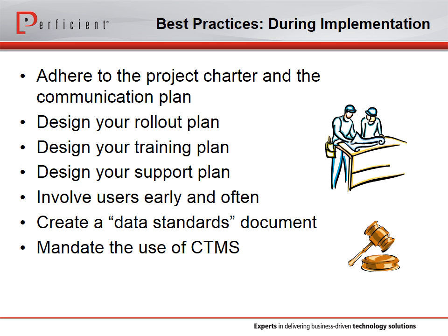The post-go-live support plan should include multiple levels of support. We often see clients identify a super user in each of their business areas, which serves as the first tier of support for the users in their respective area, for basic questions like how do I do X in the system. And then it'll be followed by in-house help desk support, and then external support provided by your implementation partner or your system vendor.